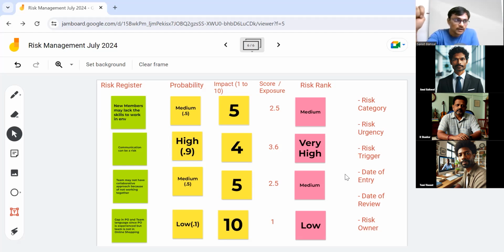Somebody will say, why do we identify and not do anything? What could be the reason? Because it may change after some time. Maybe next month when you are assessing that risk, the impact has increased. So you better record it because you probably want to reassess. But there could be some very, very low risk which you don't want to record because else it will unnecessarily create an issue for you. You can say, yes, it can go wrong, but I don't want to put it in the risk register. Overall guidance comes from your risk management plan as per your organization's attitude towards risk.